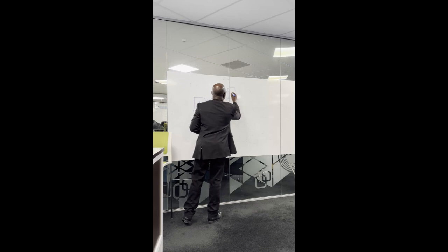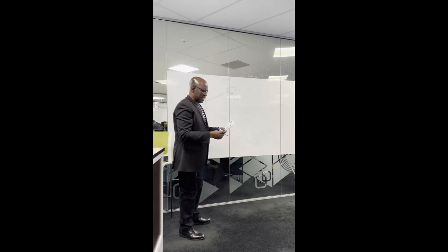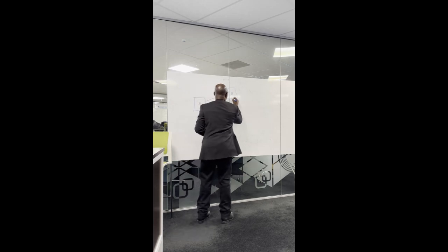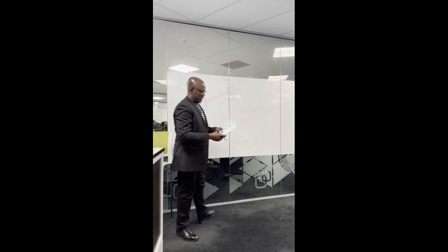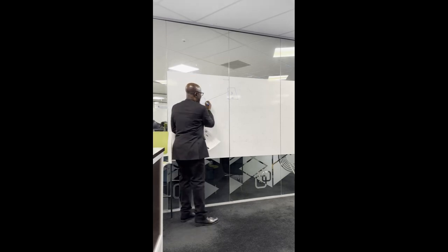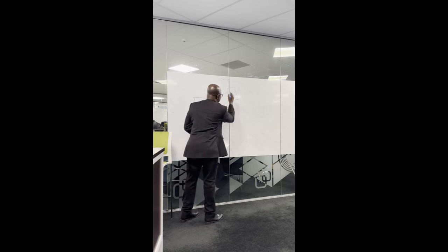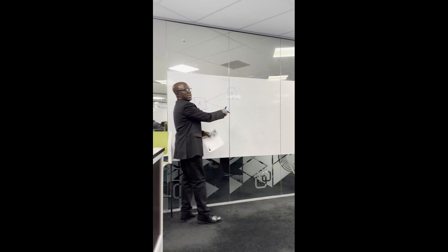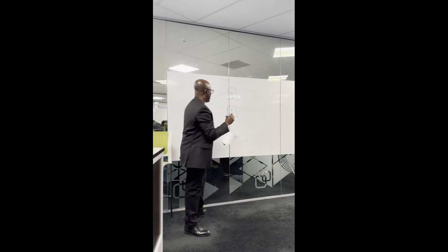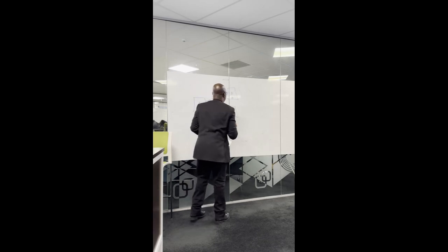We call it activity B, right? The duration for it is 15 days. We put our 15 days here. If you look at it, activity C is preceded by A, meaning that we're creating activity C, and we said it's preceded by A. That's why we are taking off from A. So let's create a cubicle like this for it, and we call this activity C. We have 10 days, we put our 10 days here, right?